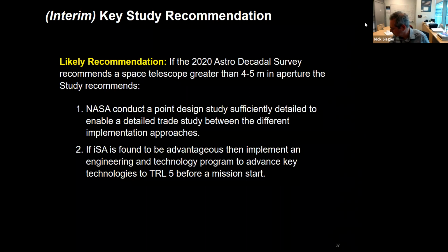And then the other end of the spectrum, if you look at the 20-meter observatory assembly and INT and commissioning approach, that is expected to take several years, up to about 4 to 6 years time frame. And that time frame is not dominated by the robotic assembly or in-space V&V. It's the launch cadence, the programmatic cost impacts, and the development cycles. We anticipate that assembly of each of the modules is a matter of a few days, and not a very long process. And again, as we go forward, if there are off-nominal issues, those will obviously introduce delays.